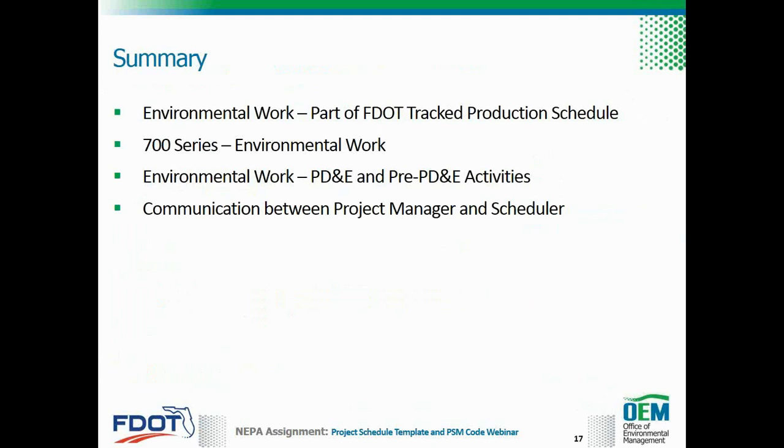Therefore, the responsibility of tracking the project activity now begins at least a year before consultant selection. Item number 4 is communication. I cannot stress the importance of communication between the project manager and the scheduler. For this process to succeed, you will need to meet with your schedulers on a monthly basis to discuss any changes in the project schedule.